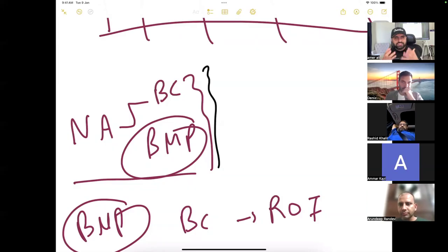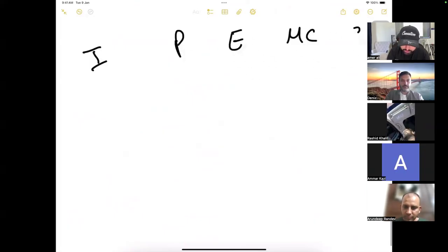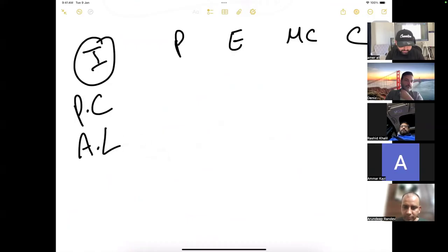And also put what happens in initiation, planning, execution, monitoring and control, and closing if you can. What happened there? Initiation has three things: project charter, which starts the project, assumption log, we will discuss them, and stakeholder register.